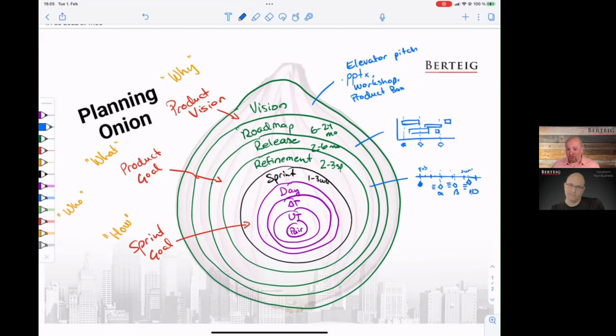We basically asked, what is the version of search, not the perfect version of what it might be a year or 2 years from now, but the one that we go live with? What can we do in less than a week? In half an hour, we redesigned the search to be whatever we absolutely need to have in that release, and it sounded to me like it took less than a week.